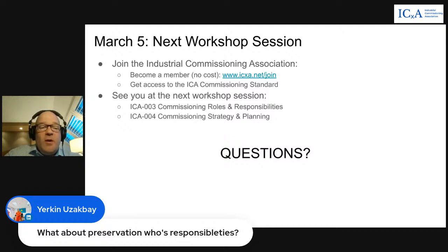Who's responsible for preservation and how those processes are going to take place is planned during our commissioning engineering. A lot of the preservation activities would be the responsibility of construction groups as they complete their construction activities, to maintain the integrity of the systems, and the proper quality and cleanliness levels are handed over to the commissioning team. That's all defined upfront in our commissioning execution plan.